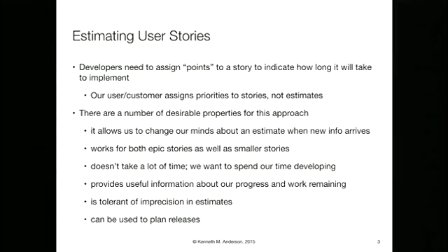The front of the card is supposed to have the requirement stated as succinctly as possible, and then on the back of the card some notes about test cases, and on the front of the card you could also put notes about some details that you've discussed. But basically the user story is meant to remind ourselves that there's this requirement that we've discussed with the user, and if there are lots of questions or details that still need to be explored, you explore those via conversation with the user or customer.